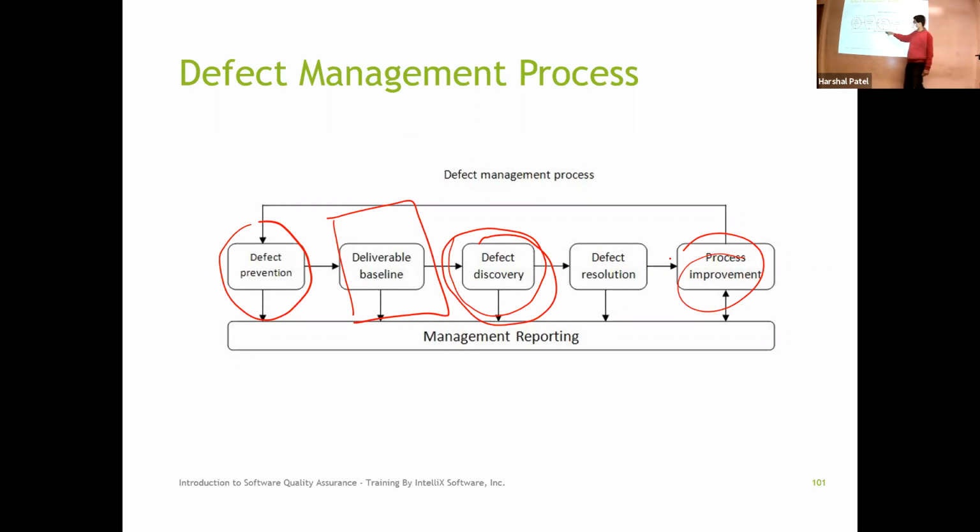And they can go back and say, you know what? In order to prevent the defect, now we need to institute not only just the review, but every time you perform a new code release from development to test, you have to follow this standard. And that becomes a new baseline. And then you look into, okay, ever since we instituted that particular process, are we still seeing these issues or not? You see, that's how it's a constant feedback loop, going into it and constantly improving.